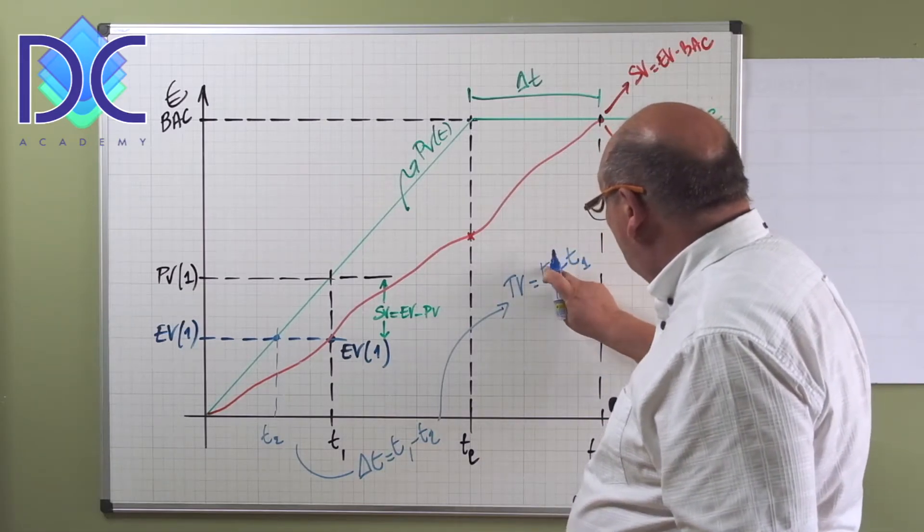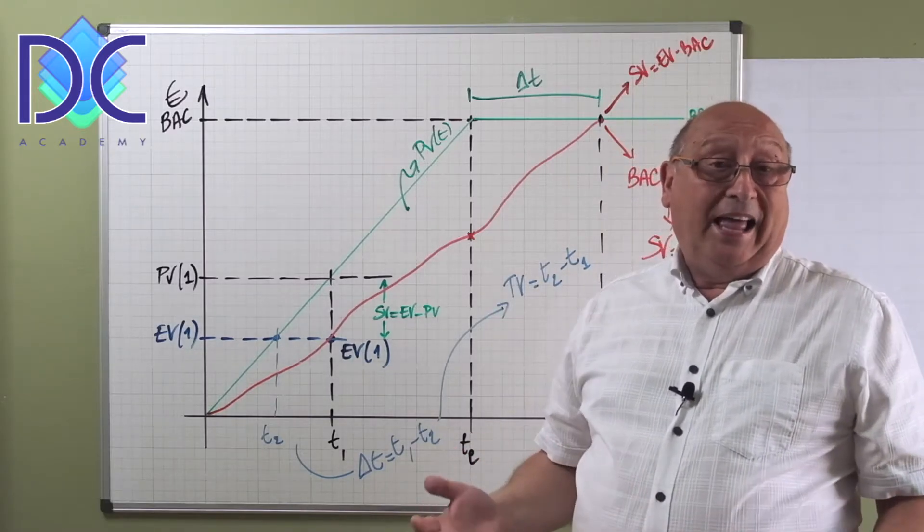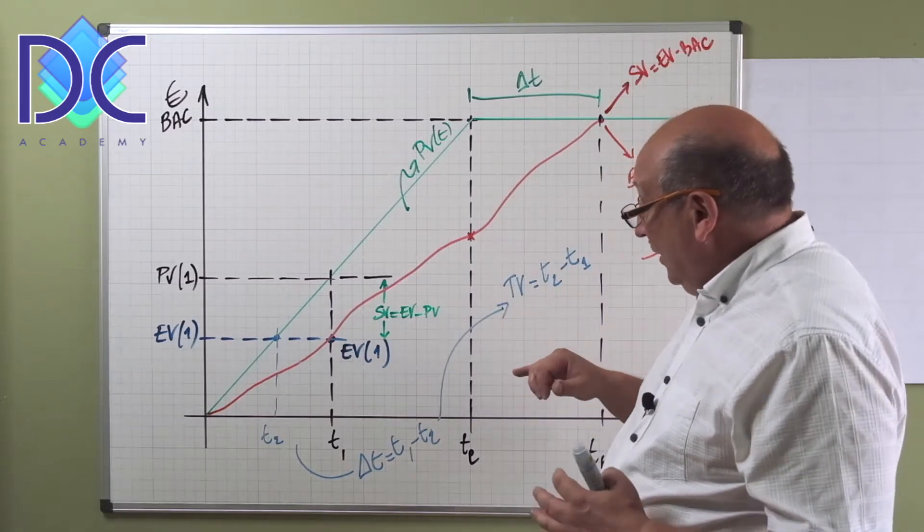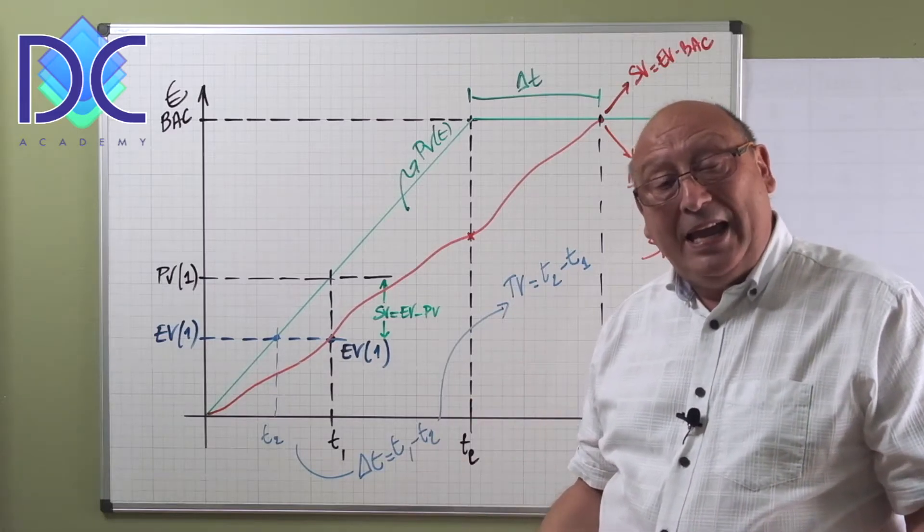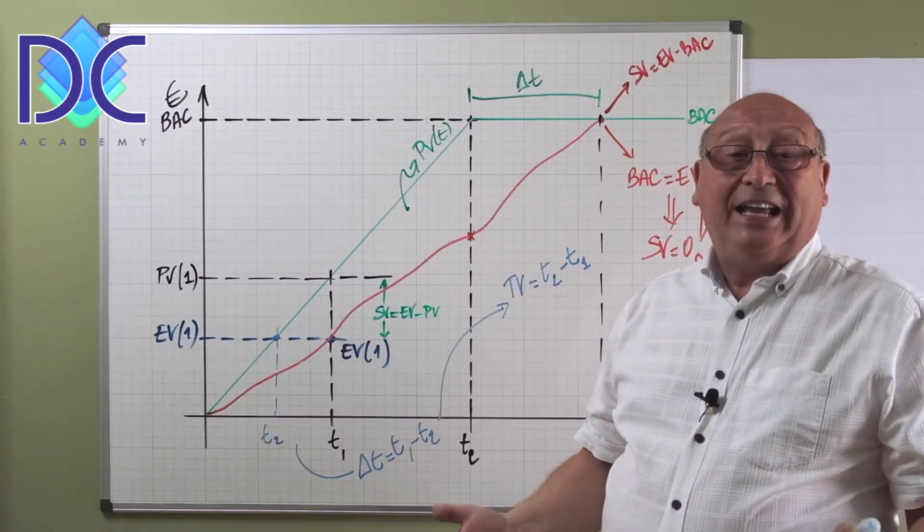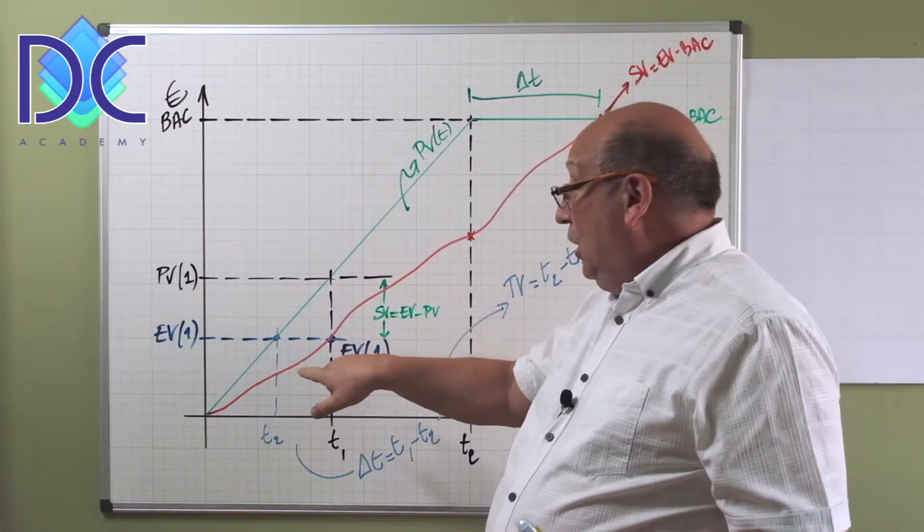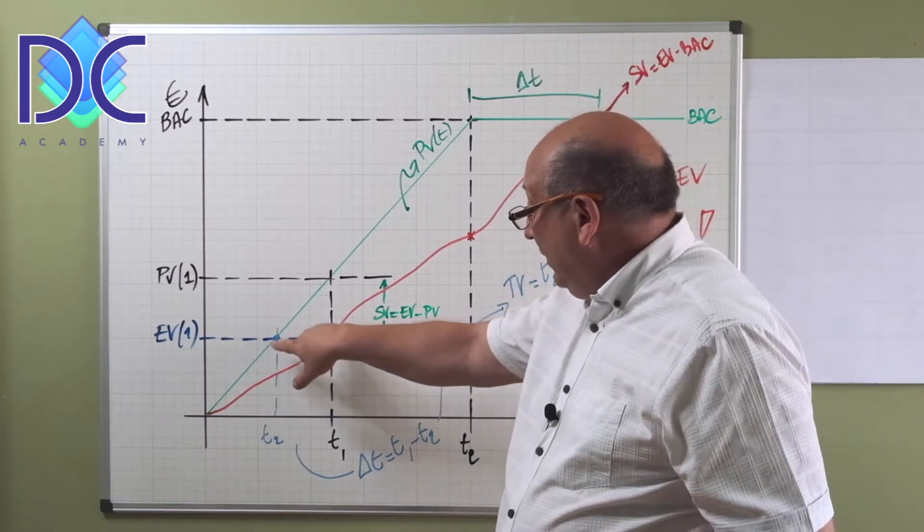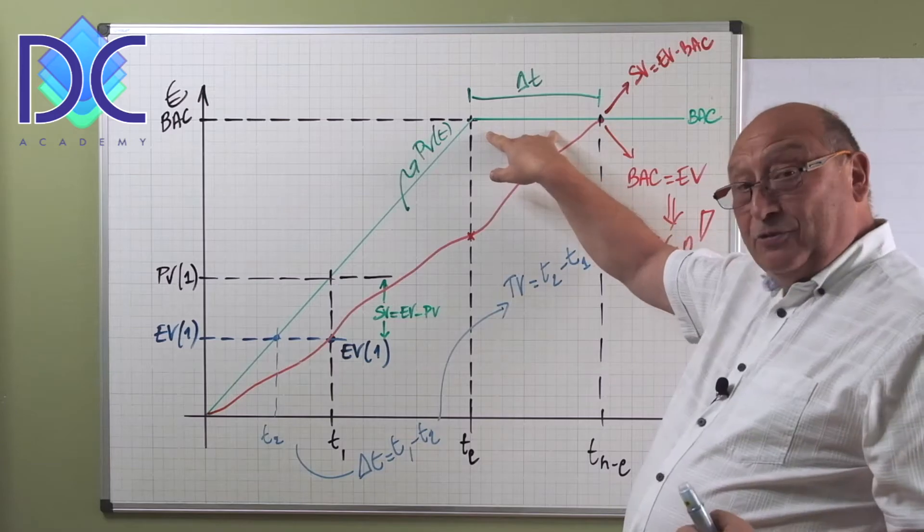Or when we put it as a new parameter, we can call this the time variance, which is then t2 minus t1, which again gives us a negative value while we are late. So the time variance, which is in fact looking at it a different way, and we call this earned schedule. We are not looking at the amount anymore, but we really look at the time difference.